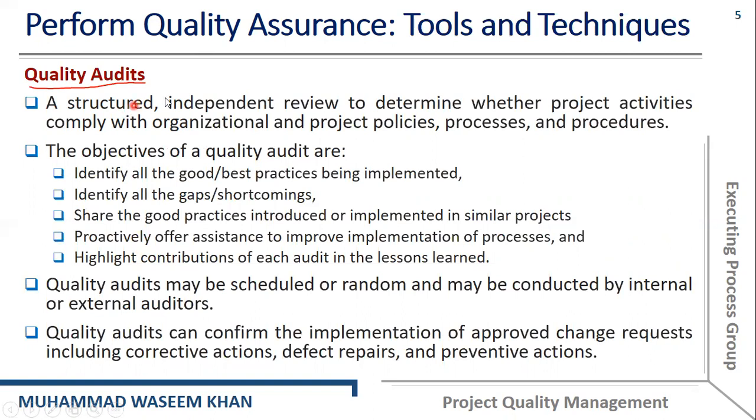In this process, a structured independent review is used to determine whether the project activities comply with the organizational and project policies, processes, and procedures. So in this particular process, we actually perform a review to identify whether the quality of the project activities is according to the organizational or project policies, procedures, or processes. The objectives of quality audit are to